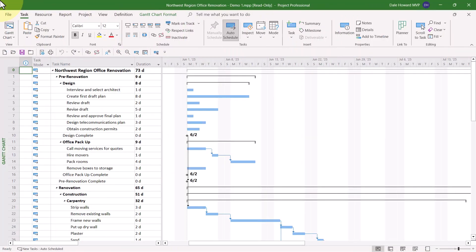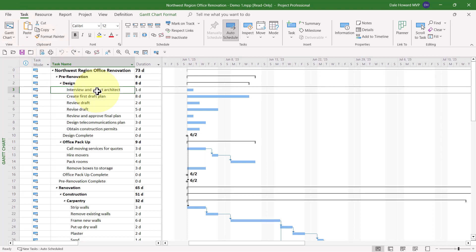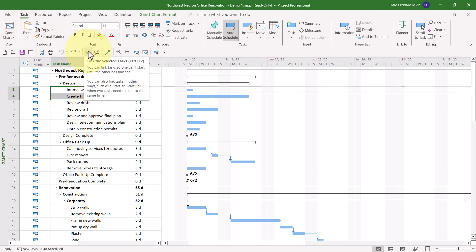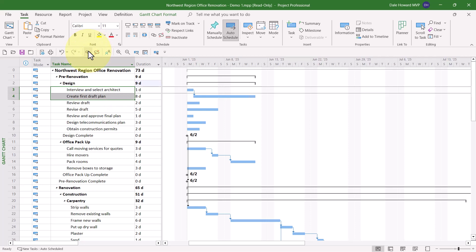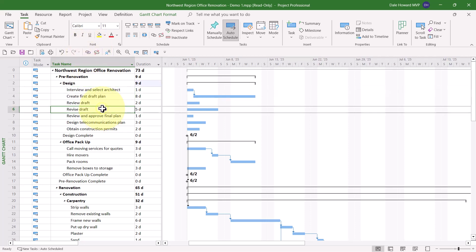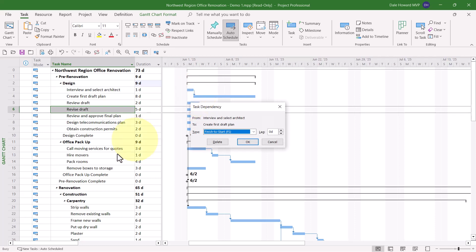Let me show you the first trick. Select the tasks you want to link and then click the Link the Selected Tasks button. If that isn't the dependency relationship you want, which is finished to start, double click anywhere on the link line between the two linked tasks.